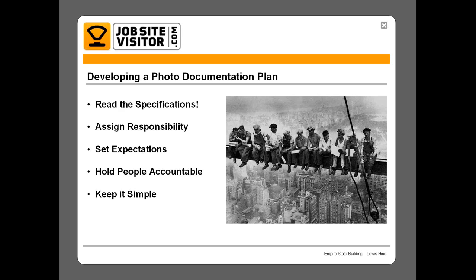So when you're developing a photo documentation plan, the first thing that you'll need to do is read the specifications. Everybody needs to be on the same page and understand what the deliverables are and how often you're going to take progress photos, what you're going to take photos of when it comes to underground and pre-slab photos and in-wall rough-in photos and all those things. So like anything that's spec'd, it's important to put together a submittal, get that approved so there's no, hey, I thought you were supposed to do this at the end of the project.